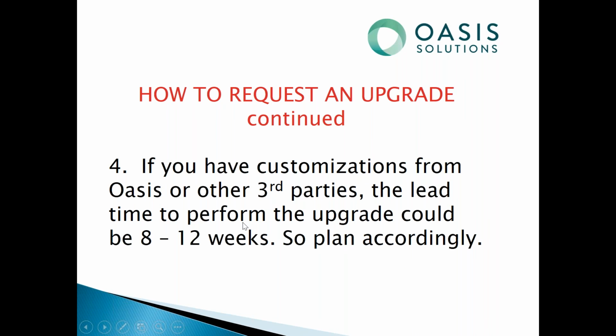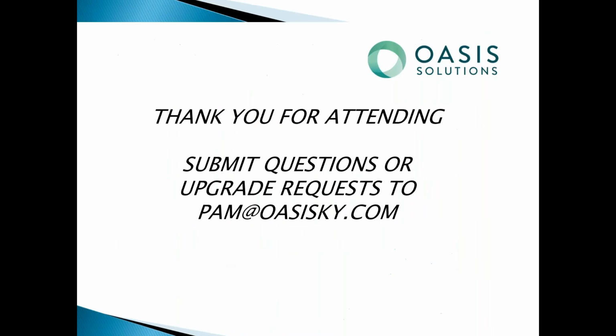And we just talked about that. You know, if you do have third-party products or custom programming, your lead time could be 8 to 12 weeks, so you do need to, again, plan accordingly.